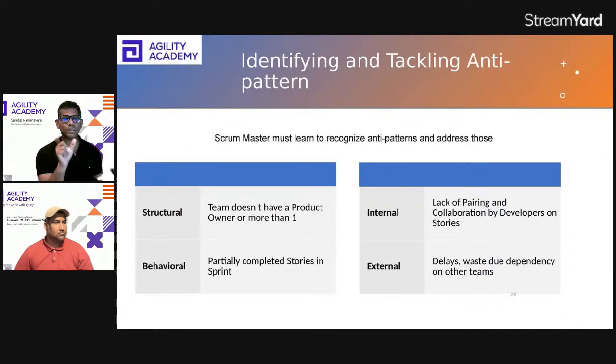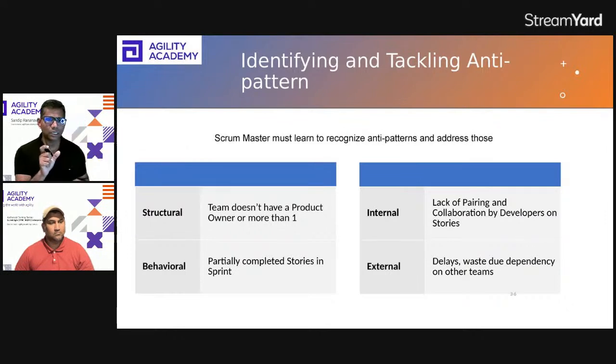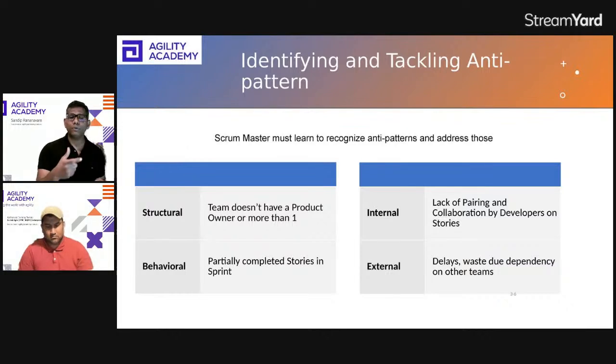So looking at story size, ideally speaking, if you are following a 2 week sprint, you don't want to have any story which will be more than 3 to 5 story points, assuming you put that into a normalized story point estimate. Something of 3 to 5 story points takes not more than a week or 3 days of effort by the team member. So what kind of anti-patterns do you have and how can you deal with that?